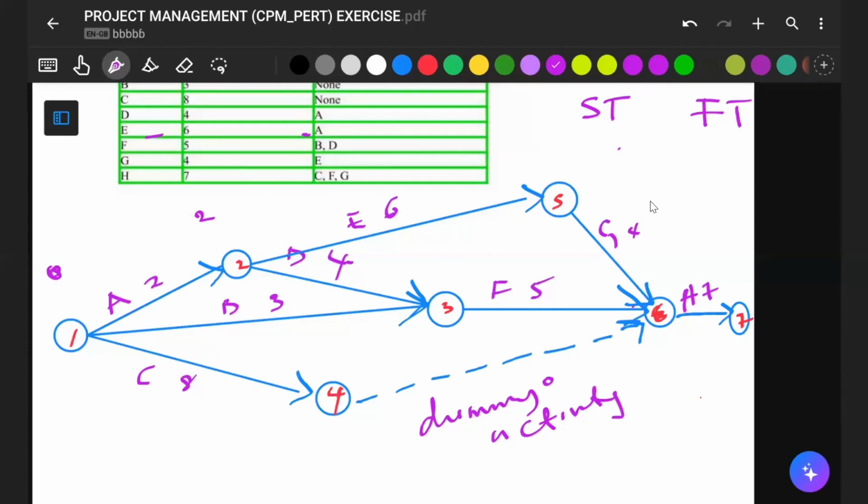The only thing you can introduce now to this is E. When I bring this here, it becomes earliest starting time. The earliest starting time for activity A is 0, and the earliest finishing time for activity A is 2. So all the figures we'll be getting now are the earliest times, and this is what we refer to as the forward pass. We are going forward until we get to the end of the project. So 0 plus 2 will give you 2 here.